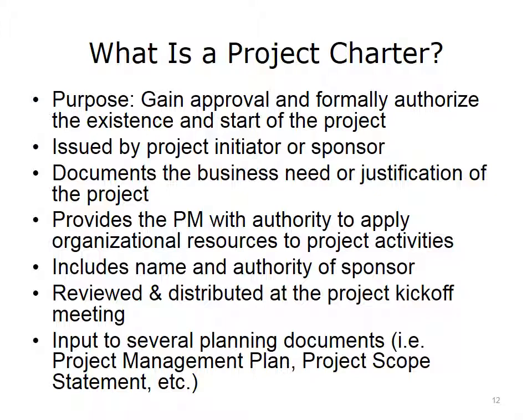Project initiation is characterized by attention to some key deliverables and events. The most important deliverable at this stage is the project charter. The purpose of it is to gain approval for the project and formally authorize it so you can get it started and launched. It is issued by the project initiator or sponsor. This is your assurance as a project manager that this project is authorized and that you are approved for starting the project and that the funding is there, and so forth.